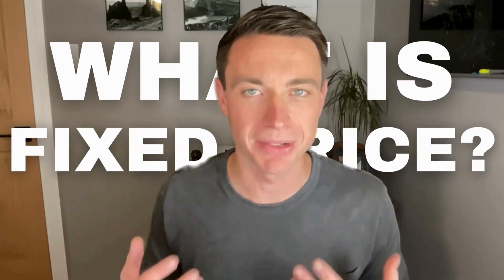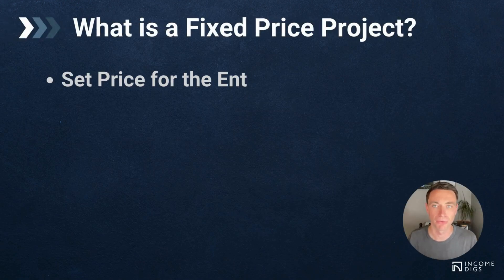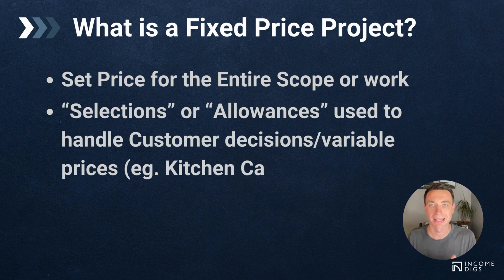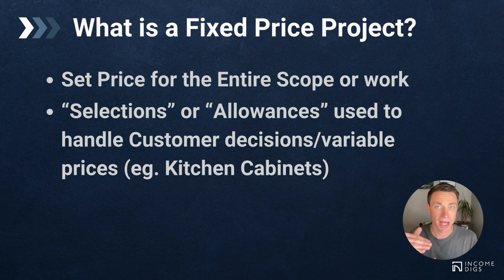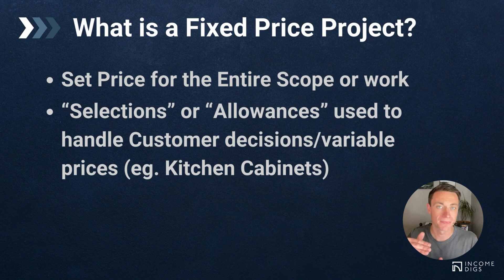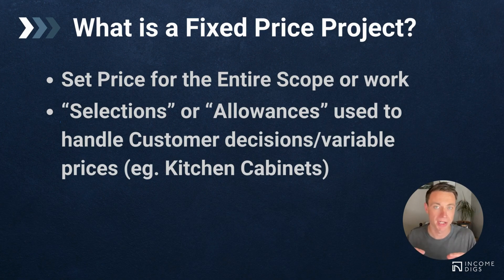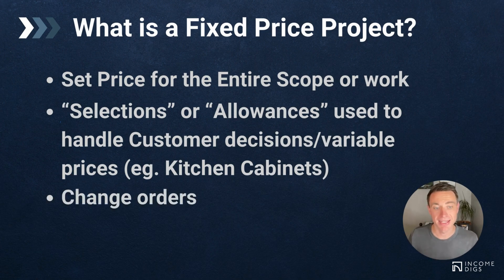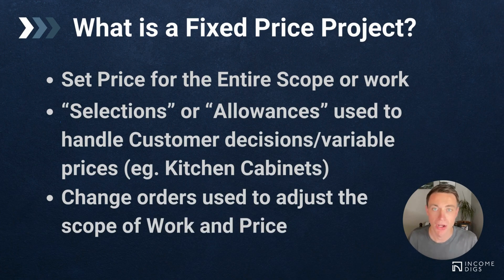So what is a fixed price contract? Basically, you set the price for the entire scope of work. That price might have some built-in flexibility in what's called selections or allowances. For example, the entire project might be $100,000. Baked into that is a certain amount for allowances — say your kitchen cabinets at $25,000. If you spend a little more, that marginal increase goes on top of the $100,000; if less, it's deducted. Beyond that, change orders are exclusively used to change the price of a project — the price doesn't change without a change order being issued.